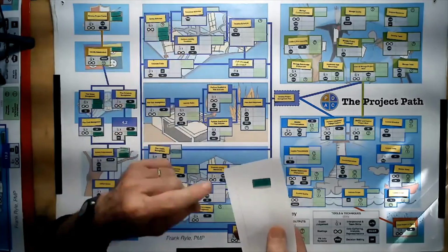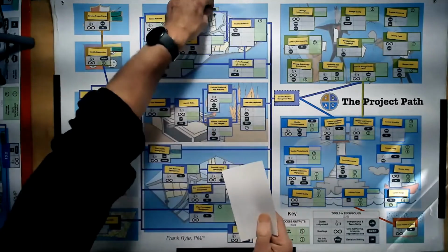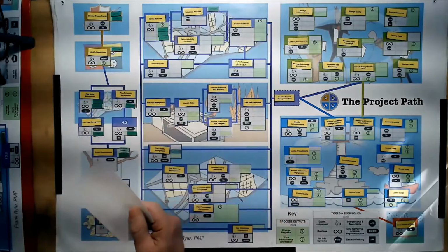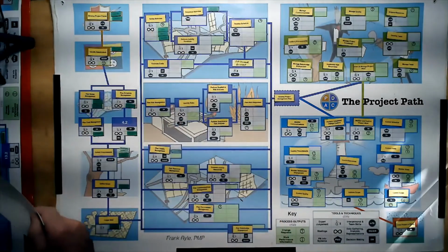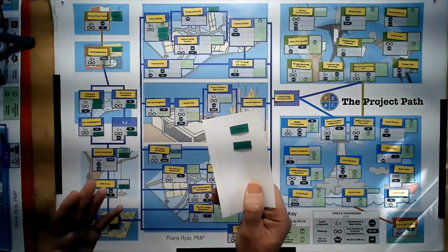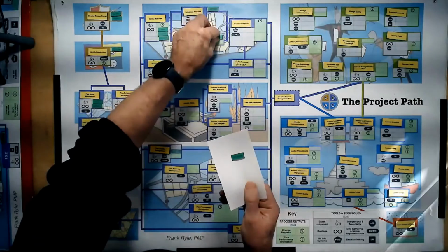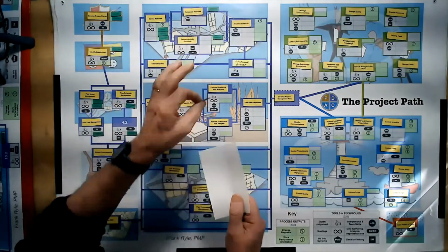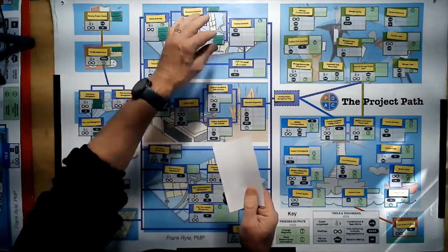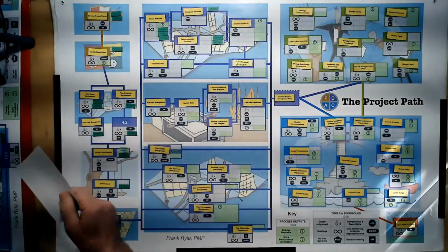What do you think the output is going to be? And it's called a network diagram. Okay. Project schedule network diagram, and that makes sense. Now, when we estimate the durations, there's going to be two things, and it's the same for all the estimating that you see. We'll have the duration estimates, that'll be one, but we'll also have the basis of those estimates. What was the background information? How did you get there? So that's a good one to have as well.